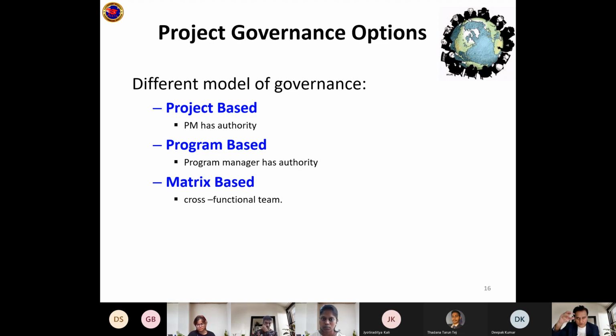So the project manager, the program manager is the boss for the program. But since you do not know anything about electrical installations, the electrician who is in your project will also report to a head electrician who knows about electricity, high voltage and low voltage and things like that. So therefore, it's called a matrix structure. So you can create a structure with dual reporting.